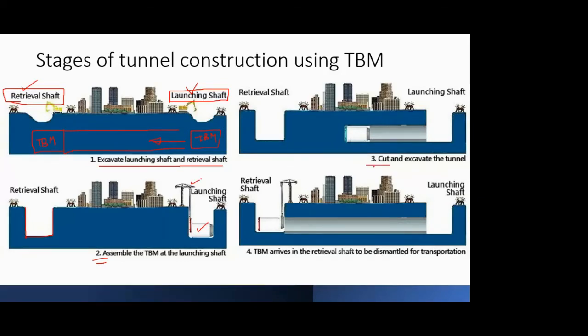Then the third step is the actual cutting and excavation process where the TBM works. Okay. And the final stage is, as I told you, once the tunnel is completed, you have to take the TBM back to the surface through the retrieval shaft. Okay. And then once it is taken to the surface, it is completely dismantled or disassembled.